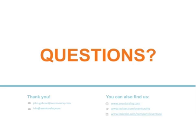So we did a phased go-live. We had our implementation team in the ER. We would enroll a new user in the application, and we would stay there with them at the elbow as they access the chart for the first time using the RAD product. That proved out to be very valuable. It was the easiest way to get to them.